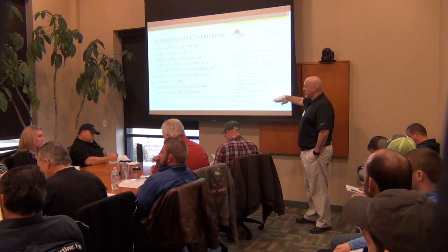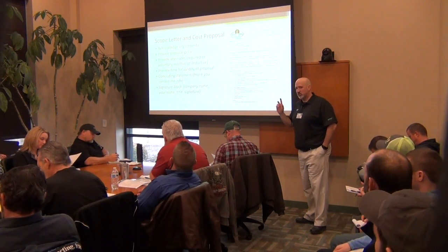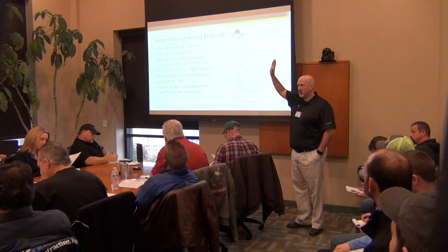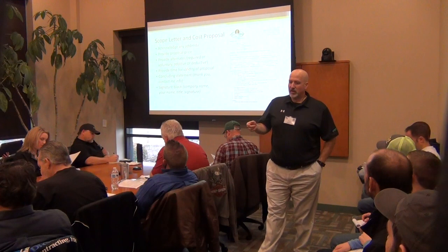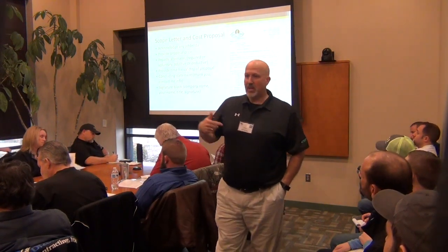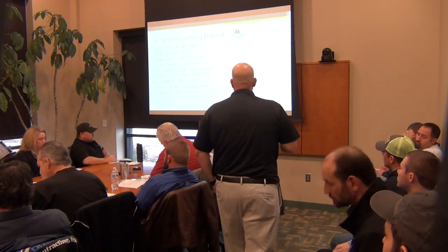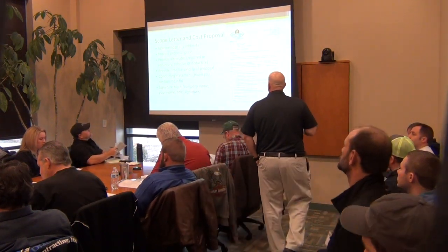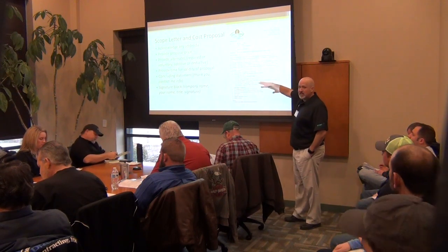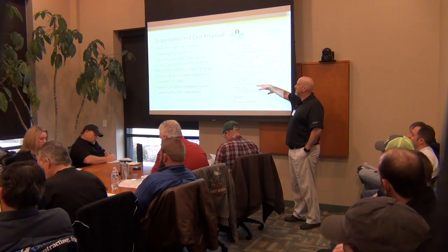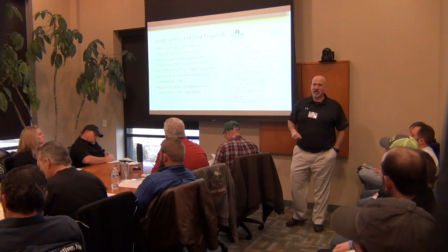And then there's alternates. And you know what, don't be afraid in your proposal, if you have a voluntary alternate. In other words, anybody know what a voluntary alternate is? It's something you came up with. They may not be asking for it, but you found a better way to do it, or you can save them on a different kind of material option. List that out. Say voluntary add alternate, or deductive alternate, however you want to phrase it. Give them the price and maybe give a real short description of what that entails.